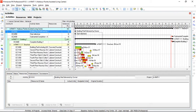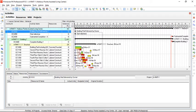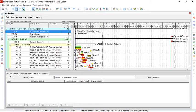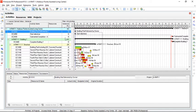There are some important points to consider in selection of activities. Number one, they should not be finished. They should be in progress or not started yet. Number two, they should be critical activities. Adding resources to non-critical activities will not change the duration of the project. And number three, they should have preferably long durations so we can witness a significant effect in project duration.